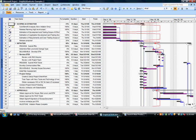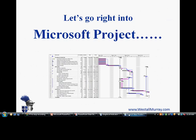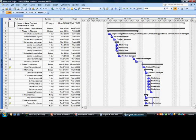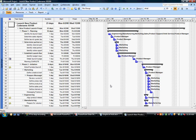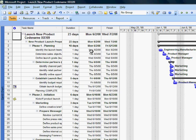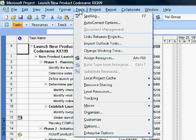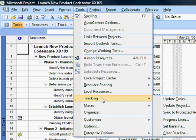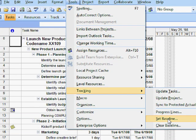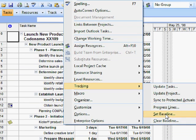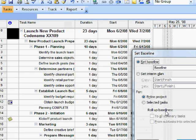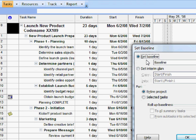Let's take a look at that right now. The first thing I'm going to do is set an interim plan. That sounds a little bit like baselining, and indeed we're going to look at the same command area within Project to set that interim plan, but it is an easier thing to do. Let's go to Tools, Tracking, and Set Baseline. However, once we click there, we're not going to set the baseline. Instead, we're going to set an interim plan.